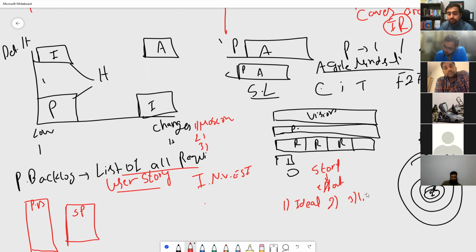We put the user story as 1, 2, 3, 5. This is the most recommended because you can put the story points. Always remember, they are relative estimation, lightweight estimation. The story points of one team and other teams are different. For the same work, there will be different efforts required because every team perceives the work differently.